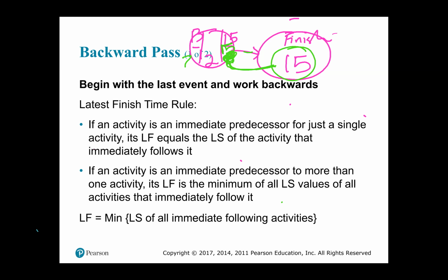If you had other nodes that terminated in the finish node, you will also take the information from the finish node to those other nodes also. In this instance, there is only one node that came into the finish node, so the information will only go to one late finish slot on the backward pass.